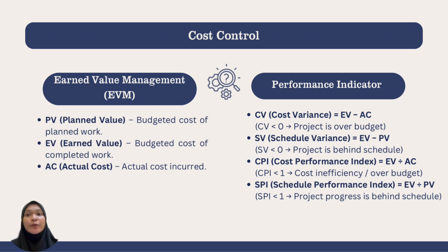In addition, we implement change control procedure where any change to the project scope or budget must be reviewed and approved before they are implemented. Overall, EVM and these monitoring tools help ensure that the project stays financially viable and progresses according to plan.